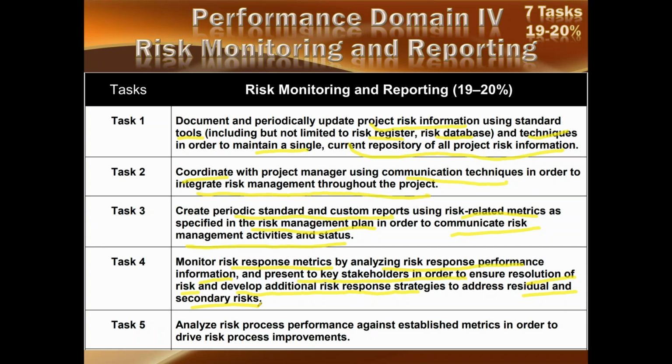That means that the responses which we had already created might have left out some risk, intentionally or unintentionally. So the remaining risk is called residual risk. If you need to treat that, you have to create your risk response strategy to deal with it.